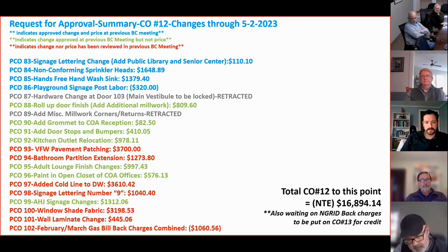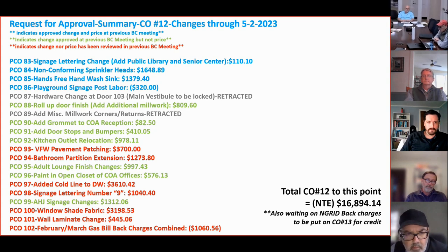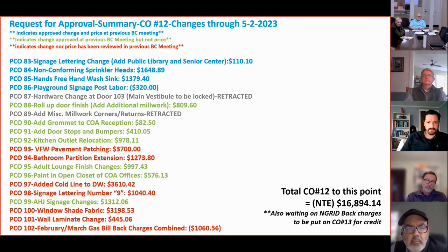All right. I make a motion to approve the PCOs and change order 12 for a not to exceed amount of $16,894.14. I second. More discussion? We've been pretty clear so far. Roll call vote: Paul Flaherty, aye. Steve Rackett, aye. Dee Heckler, aye. Mike Howell, aye. Don Spargo, aye.